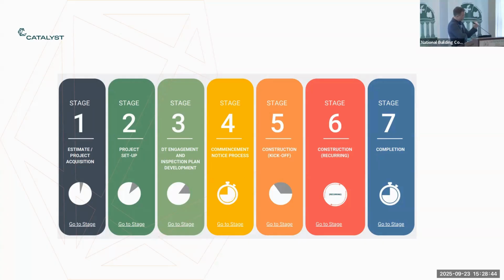But again, in terms of level of completeness, there is a minimum bar that we need to achieve for a commencement notice. So part of it is auditing that information and seeing, do we have everything? Are we missing anything in terms of some of the late design items, which would be M&E?